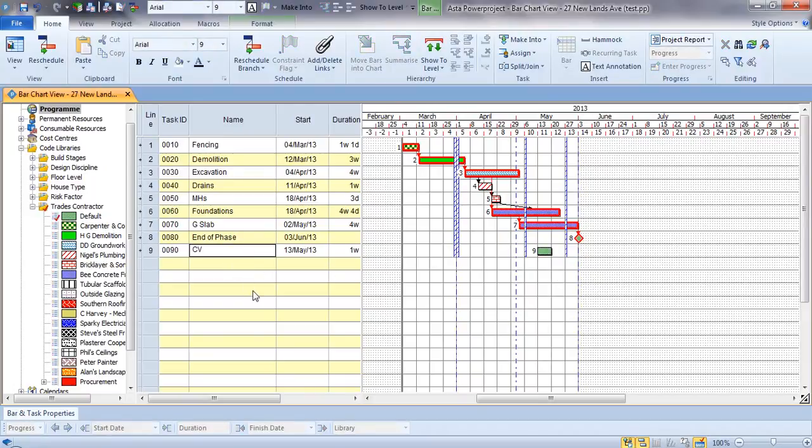So if we were going to create columns between the ground and the first floor, and we wanted to do it in two sections, we wouldn't have to put a second one on another row. Only in PowerProject can we create that same activity on the same row. There's no limit to the number of activities that you can have on one row.